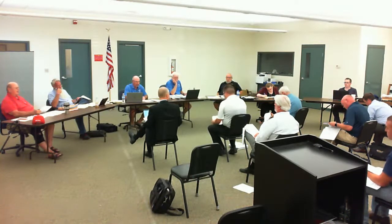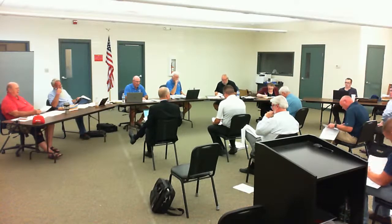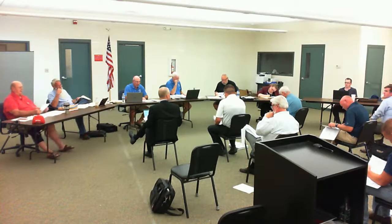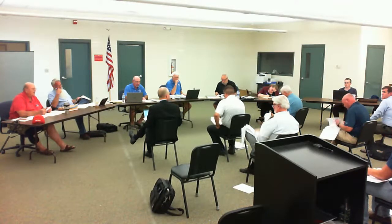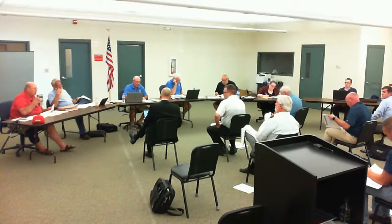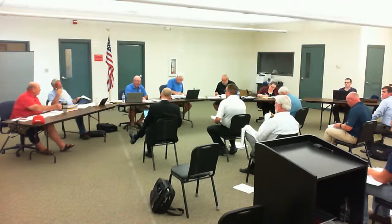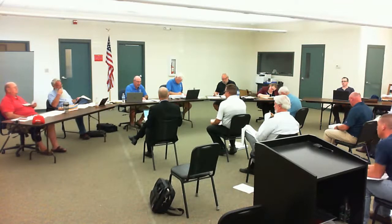On the State Road 28, the original projection was 1.736 million, and we ended up being 1.1 million. So that number will come off, about 600,000, and come off that 13 million number as well. Yes, we already paid them, and that's what Rich is going to talk to us about next.